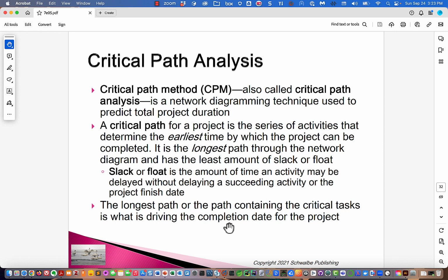So we're saying at this point in the schedule, how much extra time do I have? Some of these things that are not on the critical path, well, you could delay them a bit and they wouldn't make the project later. Okay. One fine nuance is, will they make any activity later?